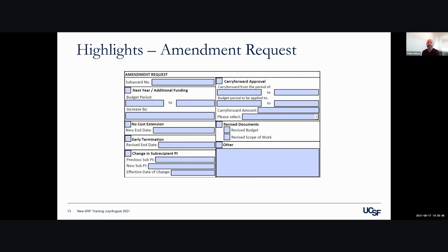So just in case there is a conflict down the line, and we have seen this, unfortunately, where the subsite thought they should be paid more for work that they did, but it was never captured in the actual subaward. Those changes were never captured, and it was already 5 years past the grant by the time the grant had ended. And so we weren't able to go back to our sponsor and get those additional funds to pay them. And it was never captured in the actual subaward that those changes happened. So we're trying to hopefully capture that information.